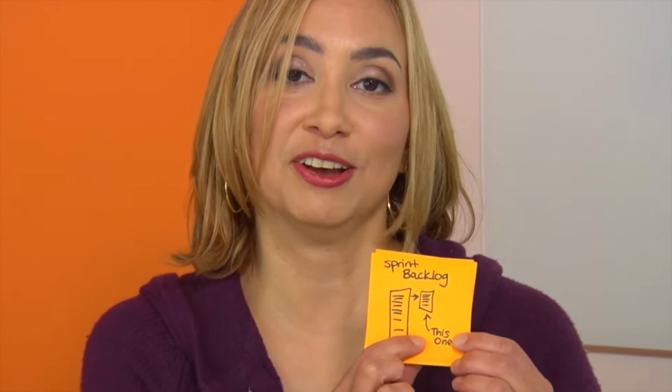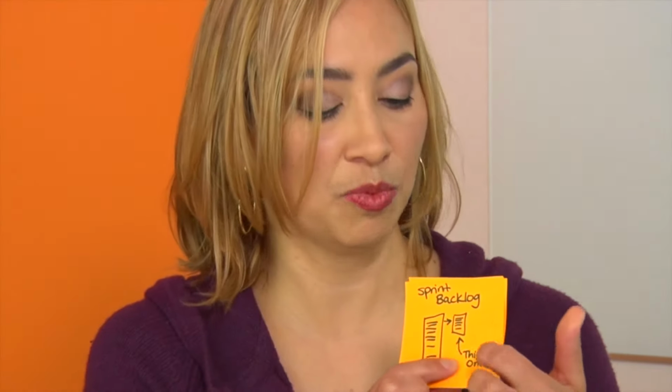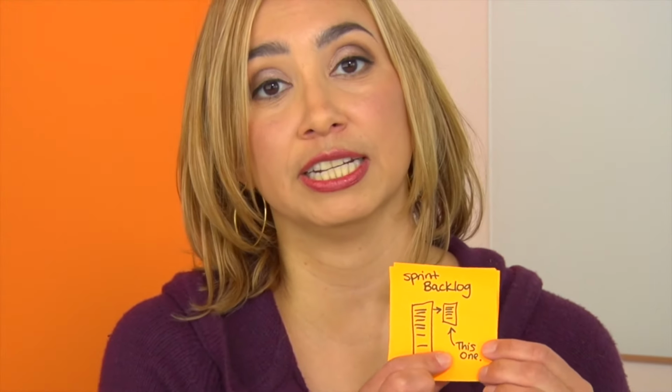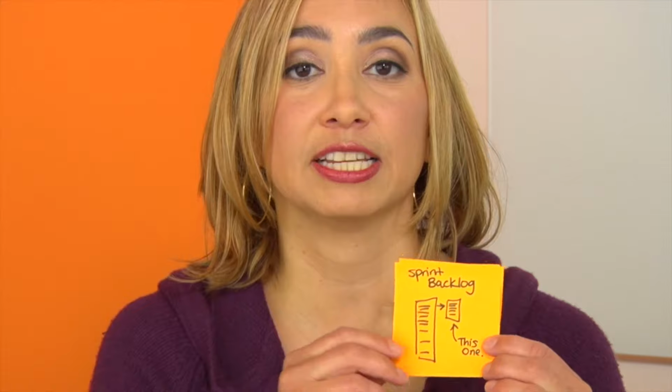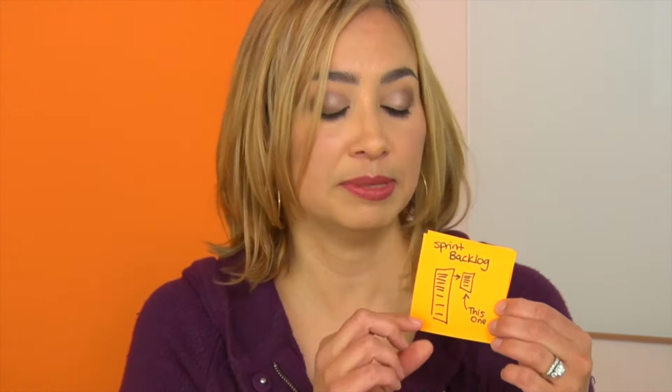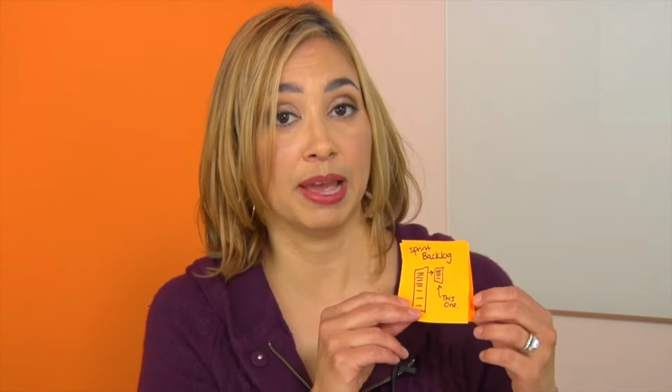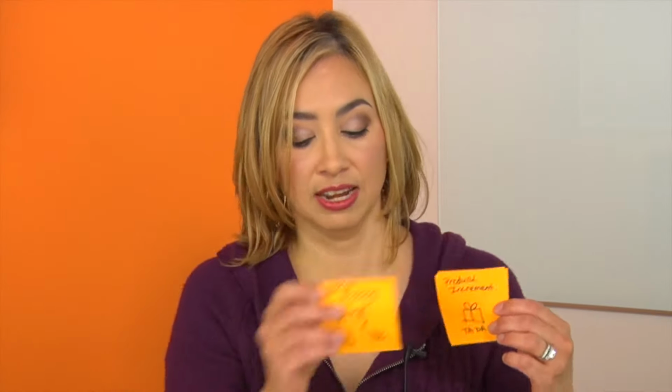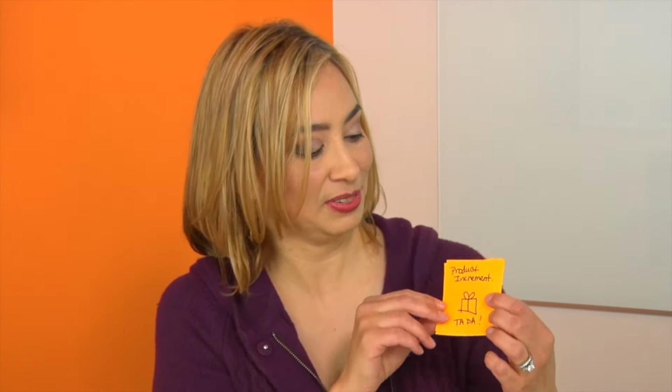So there's also a thing called a sprint backlog. This is what your development team and your product owner are going to decide can be accomplished in the next sprint, and they're going to work from just that backlog for the sprint. So it's kind of a subset of that larger product backlog of everything that we're going to do as a team, or everything that is requested of us to do as a team. Not all of it we may get to.